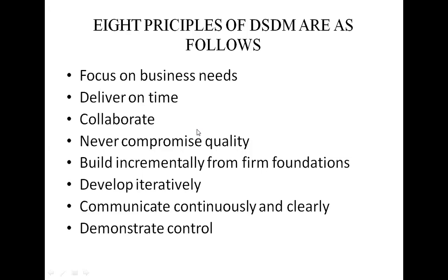So all work should aim to achieve no more and no less than that level, and be good enough to use. Also in this, build in quality by testing deliverables early and continuously. So here, build in quality is testing deliverables early and continuously, and also reviewing constantly.